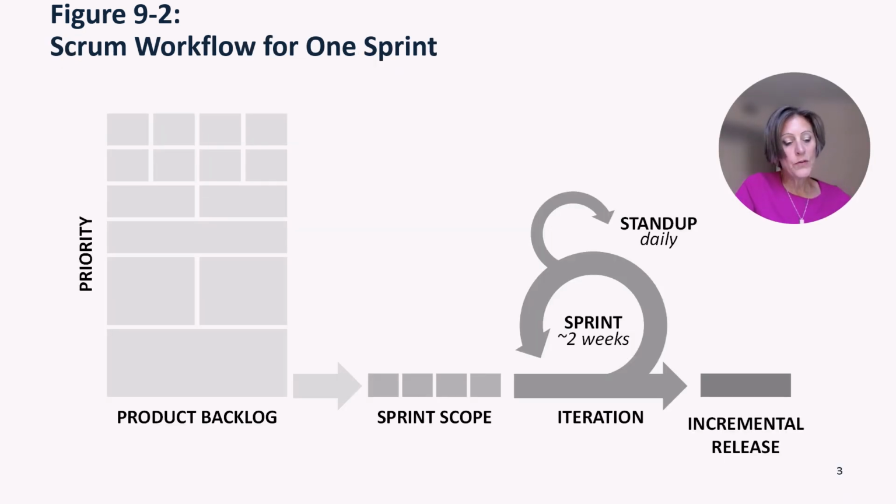Sprint. A sprint is, quote, a time-boxed iteration in which the Scrum team works and creates deliverables, end quote. For software products, a sprint duration is typically 2 weeks. But depending on the application, sprints may last 1 to 6 weeks. Sprints are designed to be short duration events in which the Scrum team works on and releases incremental project deliverables. The short duration helps the team to adapt to changing requirements. Usually, sprint durations are fixed to the same length throughout a project. This is not a mandatory element for Scrum.